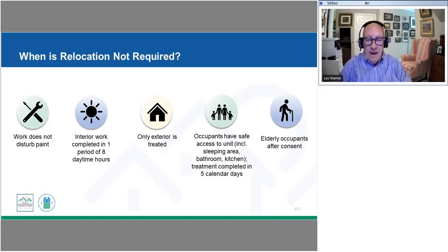Generally, we're going to take them right back to the same unit, but let's say we have a multifamily project. We could be moving people around, and we've got some vacant 2-bedroom units. We will complete the work. We will move this household from their existing 2-bedroom unit to a completed one. And because it's functionally equivalent, it is affordable, it meets all of our standards, some projects will say, we're simply going to leave. We're not going to move that household twice. We're going to move them once into this unit. So that's all part of your planning.